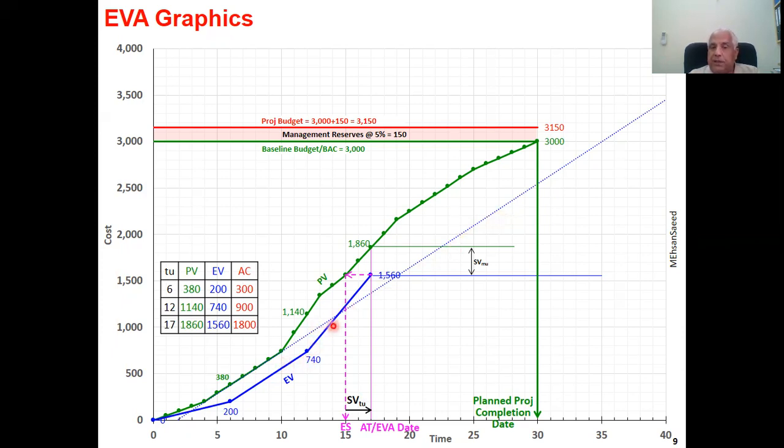So if the project continues at this rate, then this line can be folded into a single trend line. That means this then becomes your earned value line, de facto earned value line. And what value do you have to earn on this project? 3,000. So you keep going on this line and see where this line reaches 3,000. Over here, it is 2,000. Over here, it is 2,500. Keep going, keep going, keep going. And here we are. At this point, the project gains a value of 3,000.